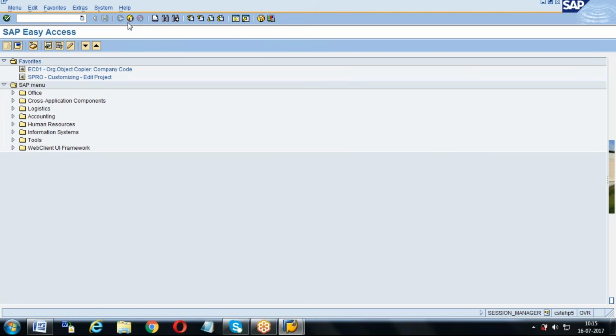They are using some systems to connect, some 20 systems we have to connect. We are almost doing 20 connections, which means we need 1 or 2 PA consultants, and the development work has also increased. In total we are expecting some 140 developments. It may be plus or minus 20 during discussions, but approximately it is 140.